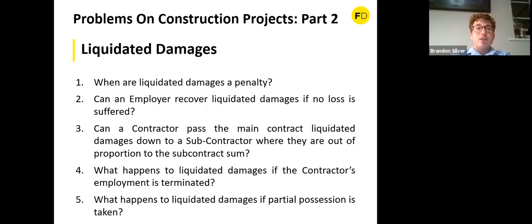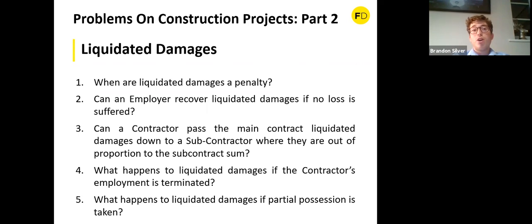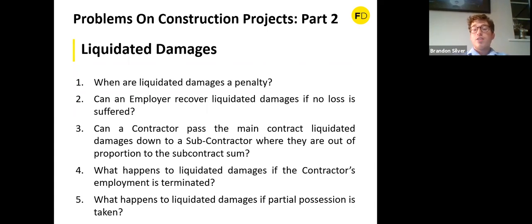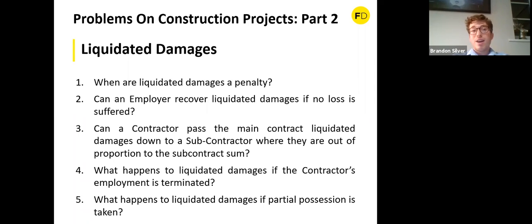The final question on liquidated damages: what happens if partial possession is taken? It depends on the wording of the contract, but if the contract includes partial possession there should be a proportioning-down clause. Because parts of the works have reached practical completion through the employer taking possession, the liability for liquidated damages should be reduced to reflect that, relieving the contractor of liability for liquidated damages for those parts certified as practically complete.